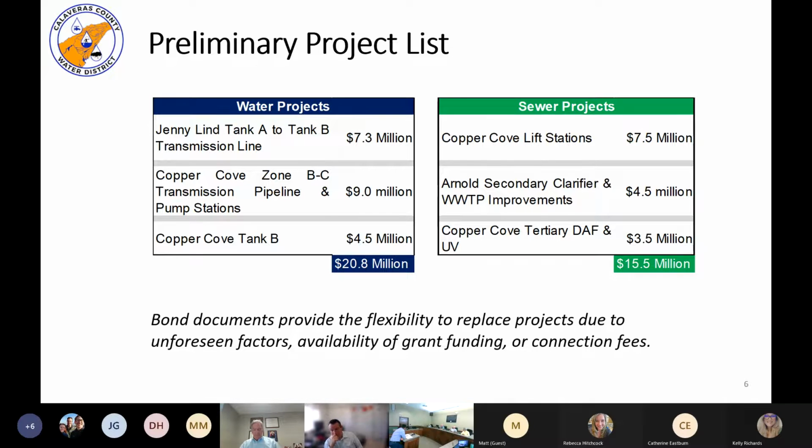We are phasing it, and we're structuring these RFPs so that it can be phased, so that we're not proposing to do all of that at the same time. That's the total project cost. That's how we always do the CIP, we include the total project cost. But when we're putting these out to bid, we're phasing them to the extent we can, and then we'll look